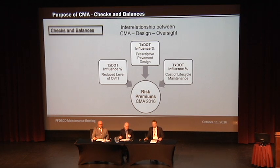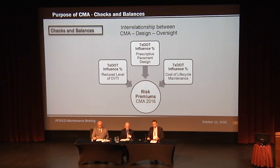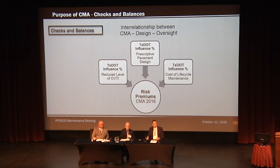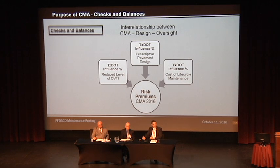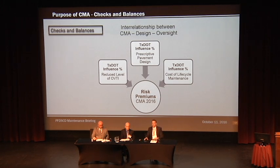If the DB contractor decides how thin or how deep the pavement is — making that decision during design and construction — they essentially make a decision as to how much inspection goes into that design. At the end, the CMA's performance requirements, the minimum performance requirements, essentially say: the decisions you, DB contractor, made during design and construction — you're going to be held responsible to meet these minimum requirements during the O&M term. What this slide is trying to represent is that as you make decisions in the three phases of design, construction, and the O&M period, the CMA is essentially how the department ensures the DB contractor assumes the risks and stands behind the product they've developed.